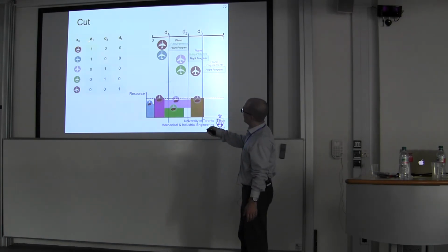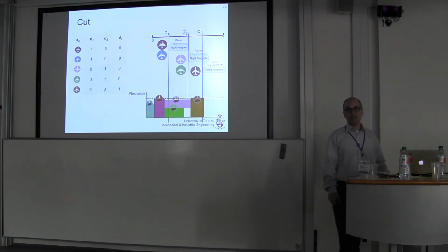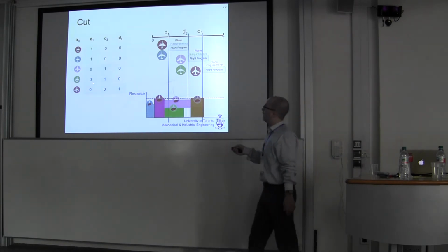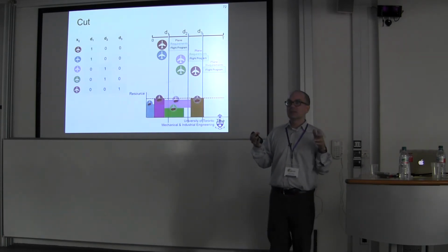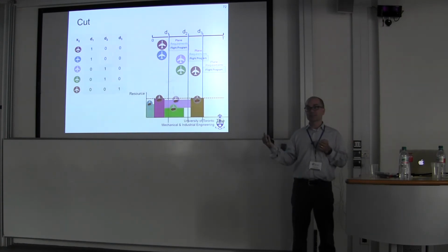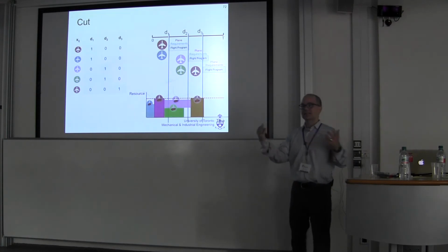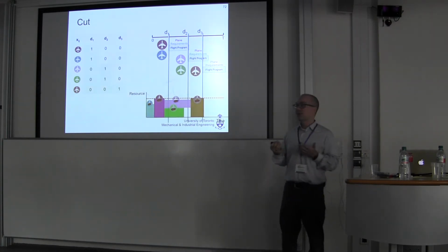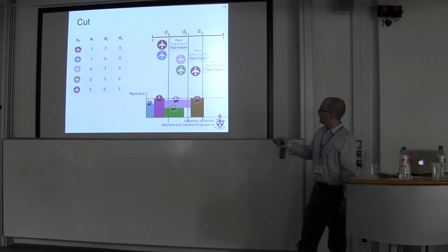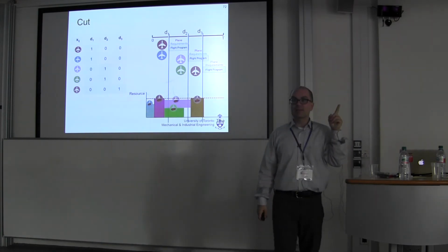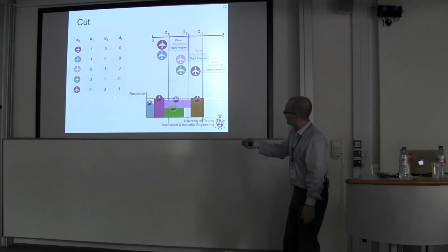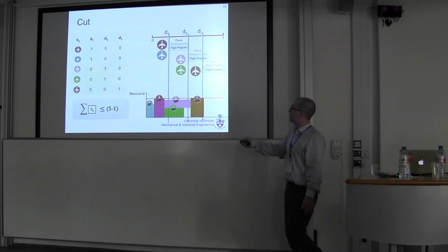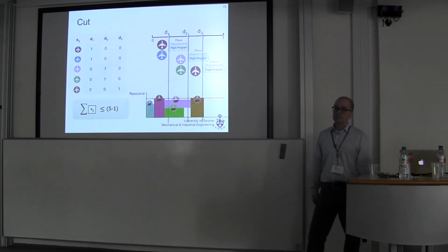All of these guys represent a subset of my Xij variables. And what I need to do is, if I'm going to create a feasible schedule, at least one of my planes has to have a later due date. Something has got to give. I got to relax my master solution in some way. Which basically means you can look at it two ways. One thing it can mean is this upper triangle, at least one of those guys has to be equal to 1. One of my planes has to be moved to a later due date. I can take the flip side of that and look at this inner triangle here and say the sum of each of these green guys has to be less than or equal to 4.